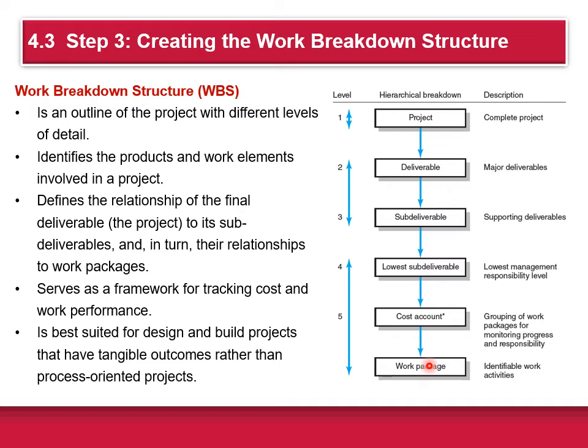These groupings within a sub-deliverable are called cost accounts, and this grouping facilitates a system for monitoring project progress by work cost and responsibility. So typically this kind of structure is best suited for design and build projects that have tangible outcomes rather than process-oriented projects. We'll talk later about another method you can use for process-oriented projects.